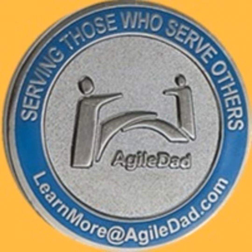So I think it's important to start with the product owner and say that the product owner has a product backlog which is visible to 100%. Anyone can see and look at the product backlog, but the only person that can modify it is indeed the product owner. But this gives the product owner an opportunity to speak to what's coming next in the pipeline. What are the next things that people should see that are ready to be addressed? This has nothing to do with the long term or the long throw of the direction that we're trying to go with the product. This is simply where we are today and what's coming up in the near future.